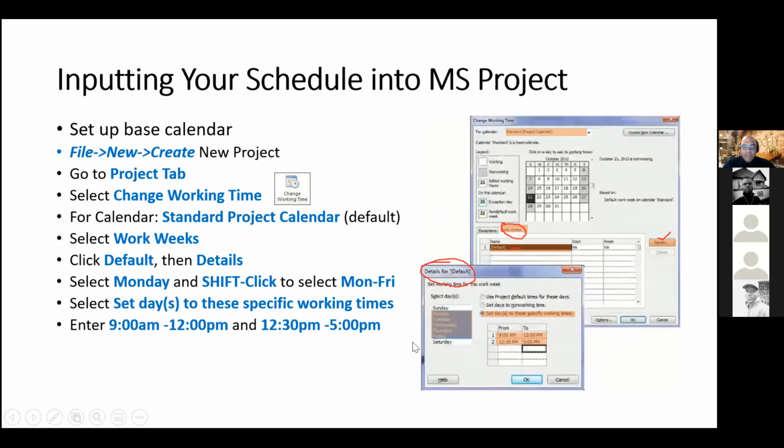example here. But it doesn't matter, everybody will be taking lunchtime at a different time, right? But in this case, it's going to be 7.5 hours. So I just created the lunch hour here, 12 to 12:30. But it doesn't matter if you take lunch at 11 a.m. or 1 p.m. All you need is to show in the Microsoft Project database that 30 minutes is your break time. It doesn't matter what specific time that occurs. So like I said, people can take lunch at any time, right? And then you click OK, and you should be done.